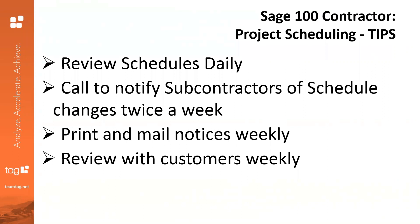Another tip: call to notify subcontractors of schedule changes twice a week. Twice a week, determine which tasks will be performed, and over the next two weeks continue to call the subcontractors and material suppliers associated with those tasks to remind them of when they're expected to arrive. If those dates have changed, make sure you continue to inform affected subcontractors and material suppliers.